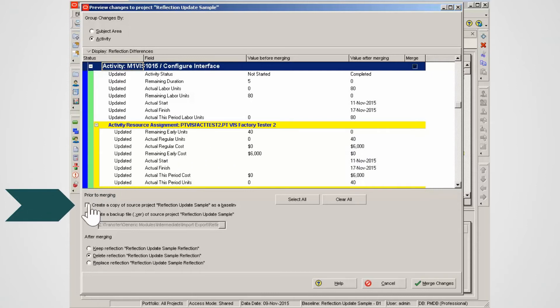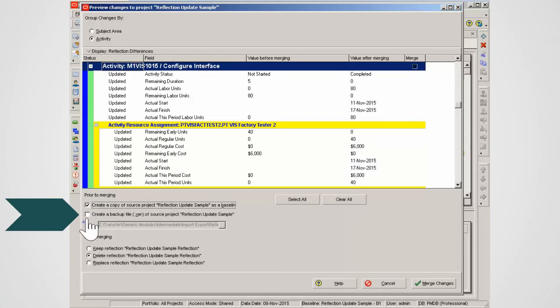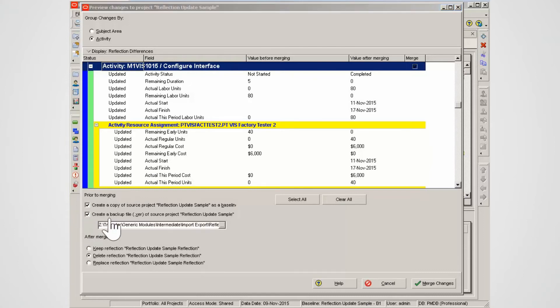Check the baseline option. Select create a backup XCR of source project option. Select a suitable file location for the XCR file.